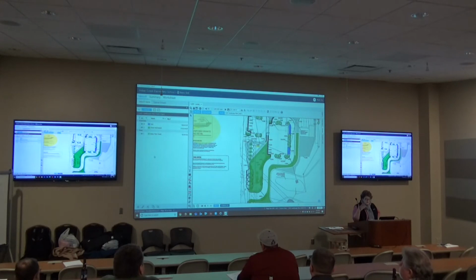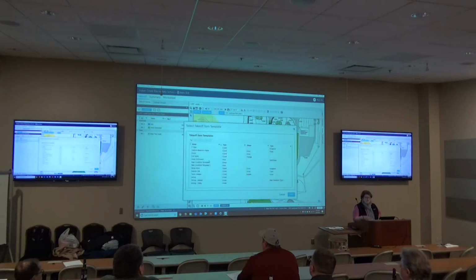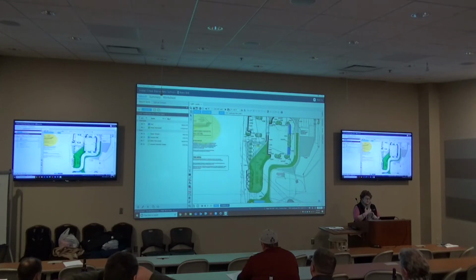And if I'm doing this for a while, what I would have recommended that you guys do is that you create a library of template items. So I've gone from my generic count to, okay, I've seen my schedule, I know what I want to pull in. I want some autumn splendor, I want a tailored juniper, and I want a swamp oak. So I'm just going to cherry pick what I want that I've already created. Those are already created with a color that goes with them, with a size of the item, the marker that we're going to have, and pricing.